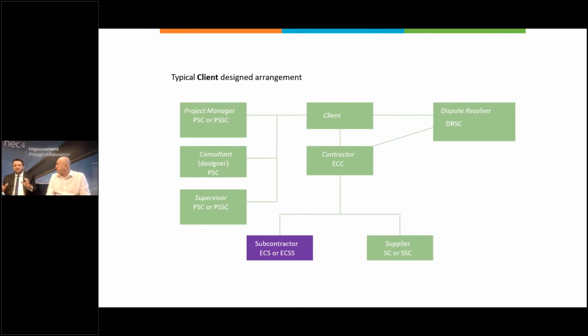Before we jump into choosing the right one, let's think about how they might fit together. This is a slide many people have seen before, a typical client design arrangement. There's not a defined term for designer in NEC, but they might be engaged by the client under a PSC, a Professional Service Contract, and then we might use a subcontract under the contractor, their Engineering and Construction Subcontract or the short form, to provide the work. So there's nothing new there.